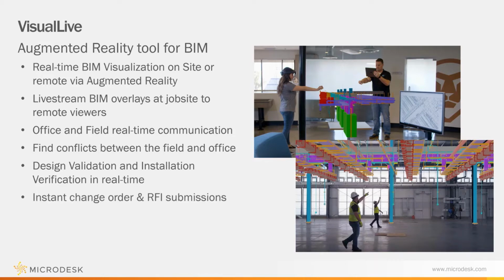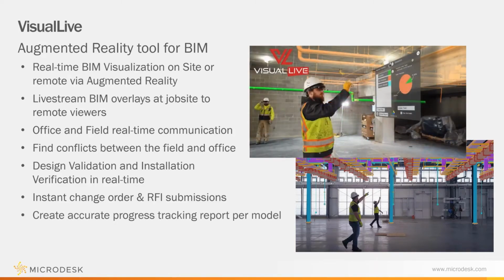Now, from that, if there's a problem or question, I can work with that with a couple of different cloud services, and I'll show you what those are in just a bit. And I can create progress tracking that's accurate. I can see the modeled elements on top of the real things, and then I can go through and mark off, okay, was this installed? Has that been inspected? You know, where are we with things? And then I can synchronize that data back home.